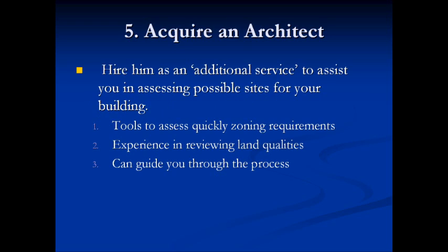Okay, we next start looking at acquiring an architect. After you have assessed which architect you would want to have on your project, you'd want to bring him on prior to doing the construction drawings, prior to the design. You want to hire him as an additional service to assist you in assessing possible sites for your building. And there are tools that he has access to that can help him to easily and quickly assess zoning requirements.